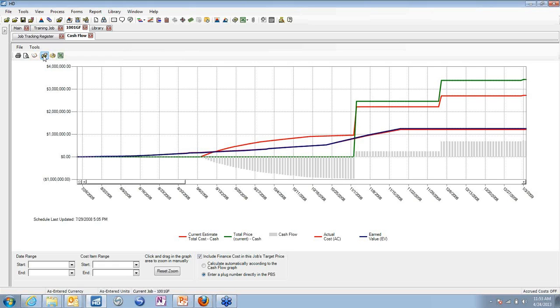However, it comes back to those questions when we were deciding, is it off course or not? In order to keep the integrity of the original plan, the original goals and objectives, sometimes it is necessary to adjust the baseline through a change order. Again, something completely unforeseen like the contaminated soil, that clearly requires a change to our baseline in order for us to meet our objectives. So hopefully that's a reasonable answer for you.